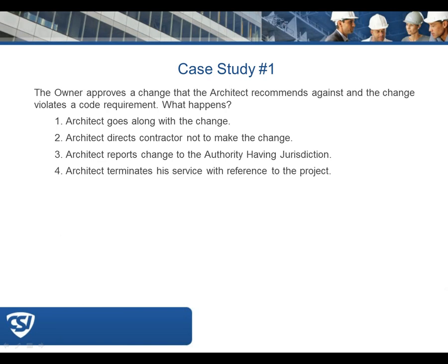Well, Doug, let me throw in there, Doug brings up a point that I think has been expounded on here, that what the state licensure law requires of the license holder may be slightly more stringent or restrictive than the contract with the owner. So in that case, you may be obligated to notify the authority having jurisdiction versus what your contract might require.